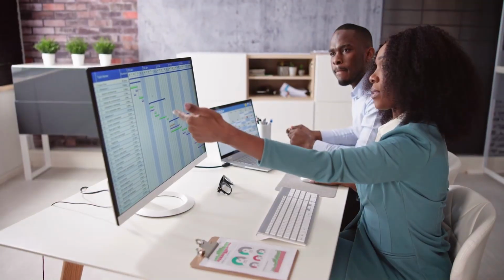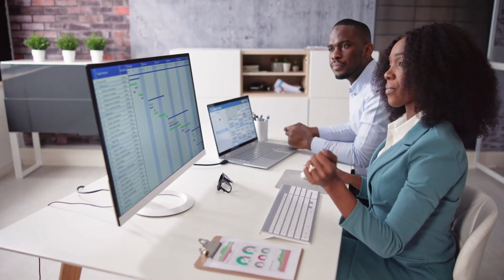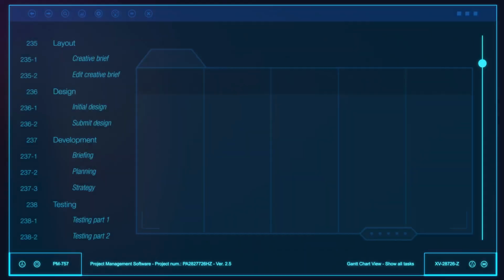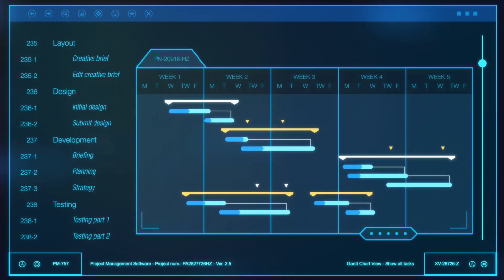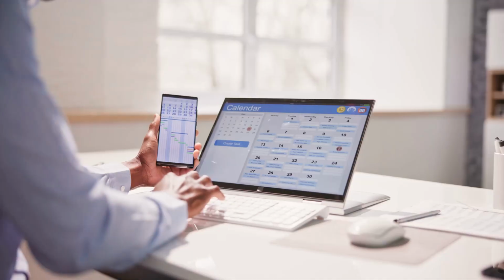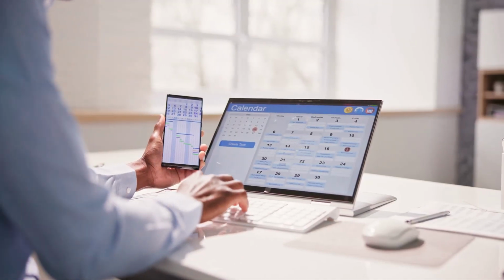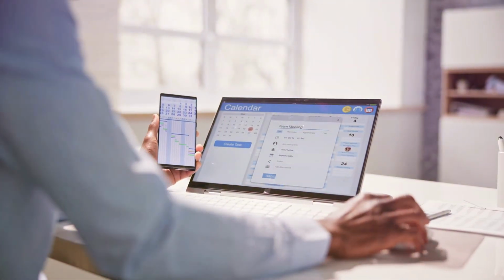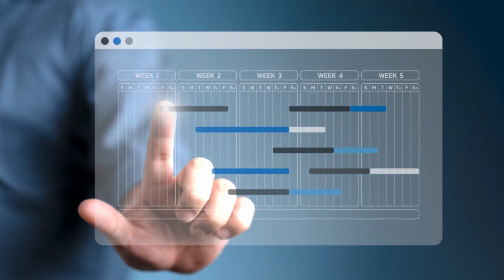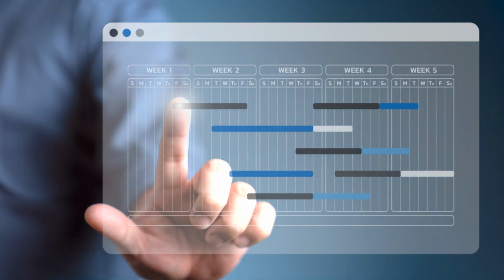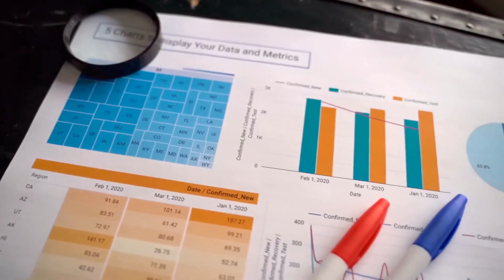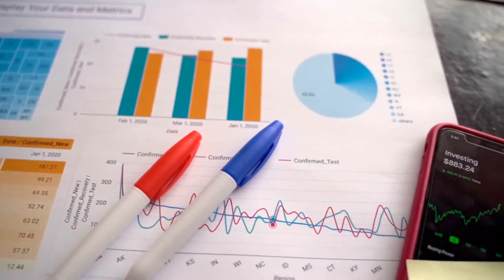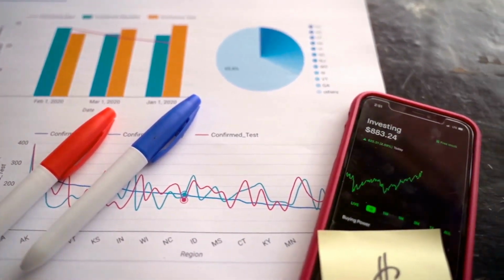In project management, mastering time management is crucial for success. The backward pass technique optimizes project schedules by calculating the latest possible start and finish times for each activity. This method works backward from the project's end date, identifying scheduling flexibility and potential bottlenecks. It complements the forward pass, which determines the earliest start and finish times. By understanding both passes, project managers can make informed decisions about resource allocation and task prioritization.